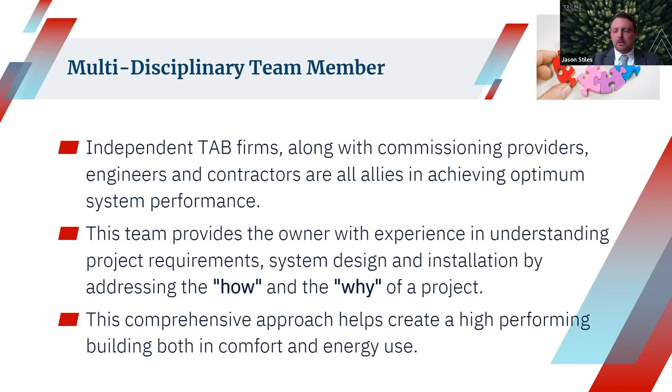Having the TAB contractor and the CXA contractor just working together, right? So we'll have the TAB do a pre-demo test, and they can report their findings back to the project developer, and then also the commissioning agent, and help the commissioning agent develop his plans of action.